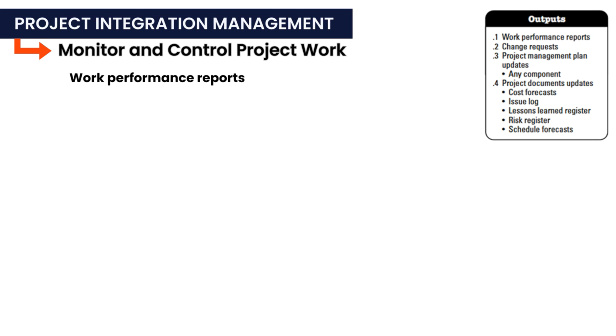These reports are distributed to stakeholders according to the project communication management plan and can include various types of information such as status reports, progress updates, earned value graphs, trend lines, forecasts, reserve burndown charts, defect histograms, contract performance data, and risk summaries. They may be presented in various formats such as dashboards, heat reports, spotlight charts, or other visual tools designed to convey information effectively and drive decision making and action.